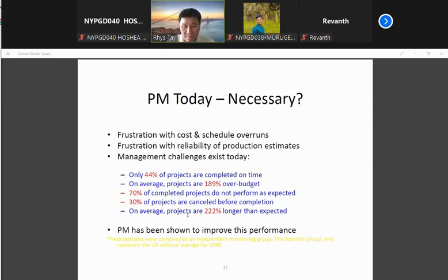So the financial manager must really keep watch of the budget, not to overspend too much until you have no money. Okay. Fifth can be government rules and regulations. There are many rules and regulations in construction. In Singapore they also keep on changing. And if you don't keep updated, you don't know. You hit against the regulation, then the government will step in and stop the project, and your project will suffer delay.